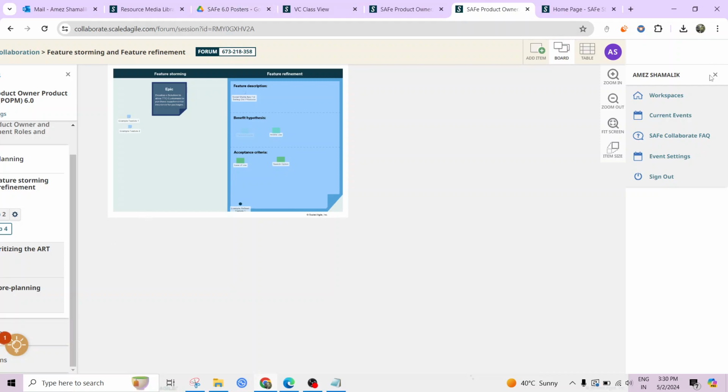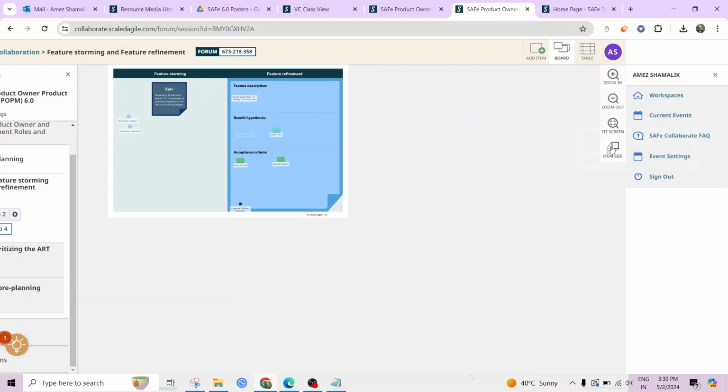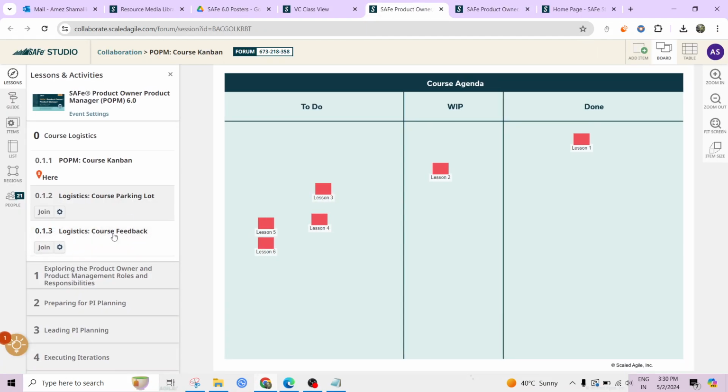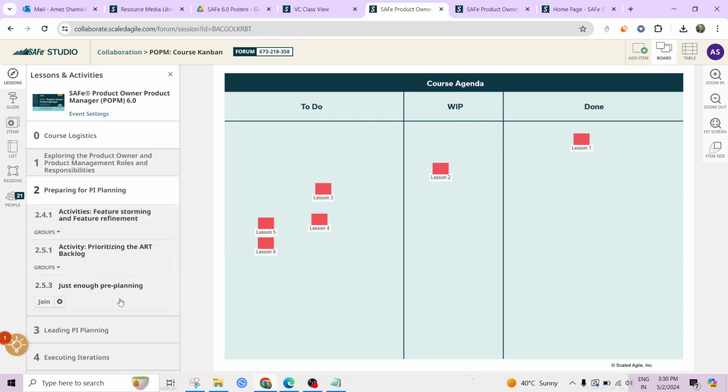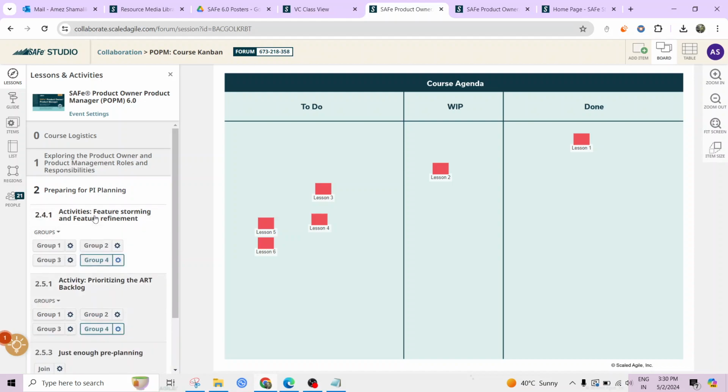You will sum up the cost of delay. Then job size, approximate, maybe your estimate or efforts needed, something like story points to build the feature. And then you find this ratio, cost of delay divided by job size, will give you what? WSJF. Yes. Okay, everybody? So fill the three features column-wise and you will get the answer. Any questions for this activity?